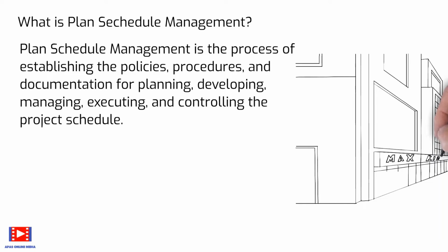The schedule management plan may also detail ways to fast track or crash the project schedule, such as undertaking work in parallel. And these decisions, like other schedule decisions affecting the project, may affect project risks.